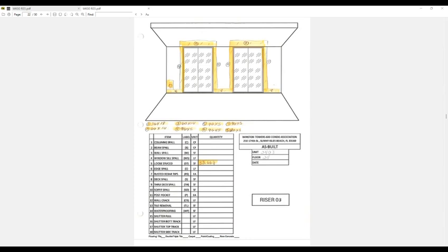Once LTM reviews it and certifies the pay application, it goes to the association, and then the association issues payment. That's how this works. And historically, I believe that's how it has worked. LTM and CTC can confirm whether or not I've represented what has historically been done. LTM, are you here?